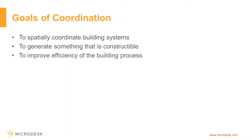What is coordination? The goals are to spatially coordinate building systems. This is taking the intent of the design drawings and documents and really turning it into something that we can build. It's MEP, structure, architecture, and all of the systems that fit into that building — making sure that they actually do fit, and in a way that's constructible and maintainable. Things where they don't bump into each other, where they're not so congested that they're hanging below the ceiling or sticking into other rooms.